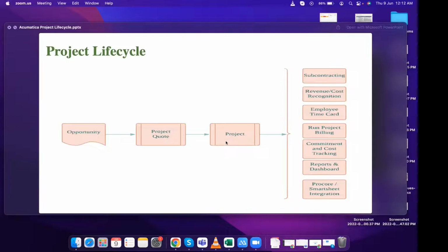And this conversion can take place through a very simple method by using project templates, where we have specified the parameters or the tasks already in that template. And once we have the project, we will finalize the BOQ, and we'll import it in the project through the Excel template. And once a BOQ is imported, we will initialize our budget, our revenue budget and cost budget separately.